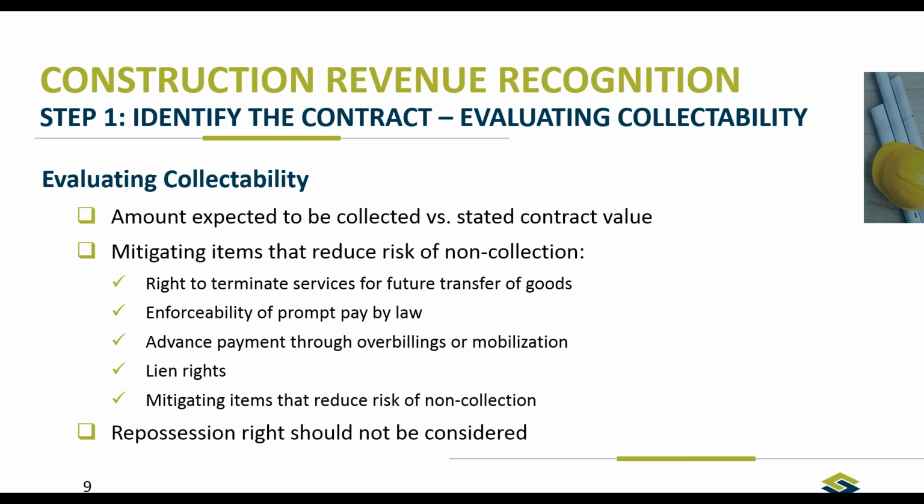Lien rights. Most of the time, subcontractors have lien rights, so that if you perfect the lien correctly and properly, you're able to collect on the contract that you're owed. So basically, that's a mitigating factor to reduce the risk of non-collection. That would also go into your assessment of determining the contract.